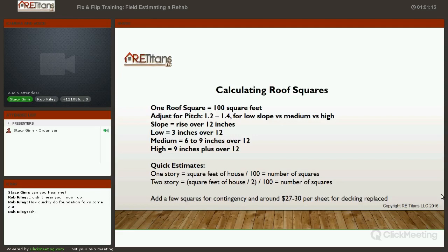There are other construction concepts when you start talking about going up versus wide, but obviously if you have a 2,000 square foot one story house, then you do have 2,000 square foot of roof coverage times your slope factor. So that's what we do on a two story. And like I said, if it gets more complex, it takes you a little bit more time, but not that much.